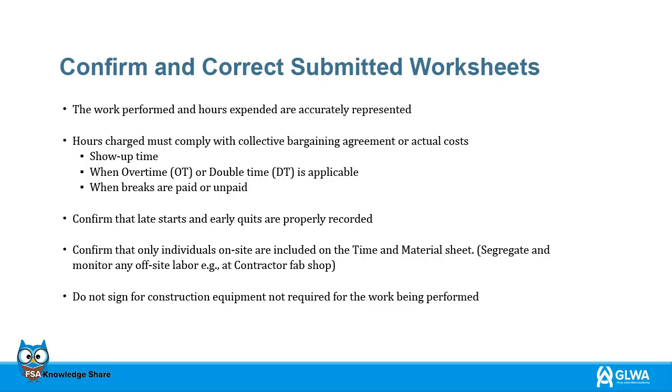Late starts and early quits are properly documented. Make sure that only individuals that are on site are included on the time and materials sheet. Segregate and monitor any off-site labor, for example, at contractor fab shop. Do not sign for any construction equipment that is not needed for the work that is being performed at the site.